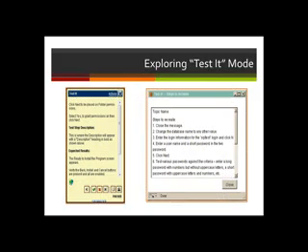Now those buttons on the bottom there, as I mentioned before, you've got your little green arrow there as a tick button, so yes, that will tick the step in the process as passed. You've got your red cross, which says it actually didn't pass, it failed. You've got a skip button. You've got the additional ability to enter notes, so against each of those steps in the test process you can put in very detailed notes if you need to, things that worked, things that didn't work well, and all that will come out in the end report. And then if we do happen to hit an issue, you can hit the pretty little icon of the bug there, and that'll then capture, and I guess the useful part there is it actually captures each of the steps that you clicked on to reproduce that error, and that also forms part of your testing document.